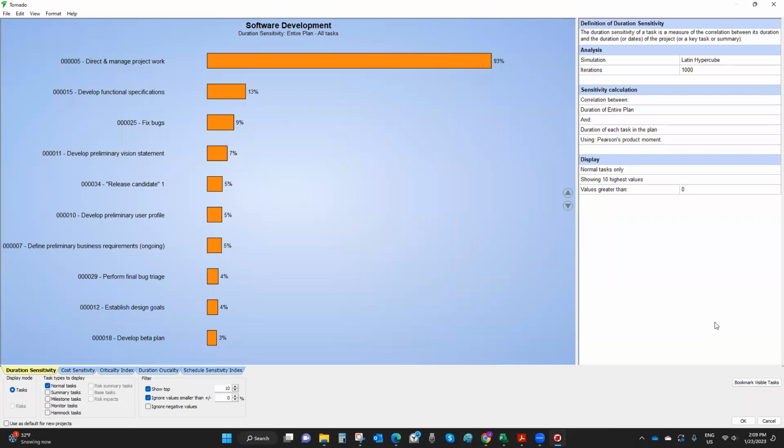So that's what you're looking at here. When we talk about correlations, the software uses Pearson's product moment correlations, which take values between -100 and +100. So correlations could be a negative value with inverse correlation. Sometimes you may find yourself in situations like that, right?